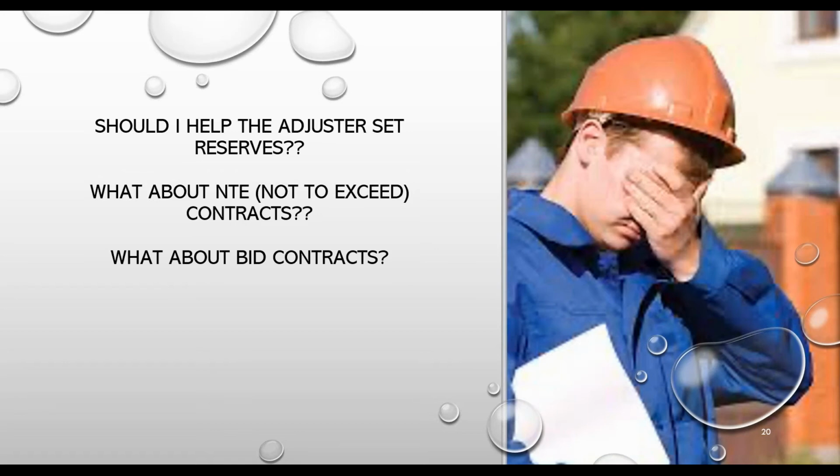So you've probably been there 2 or 3 days by the time the adjuster gets there, and you should have had time to put together some numbers. Again, you've got a different person on the task assignment form doing that for you, because that's not something you have time to do if you're in charge. But by the 3rd day, you should have a pretty good idea of what your burn rate each day is. About how much am I billing out each day?